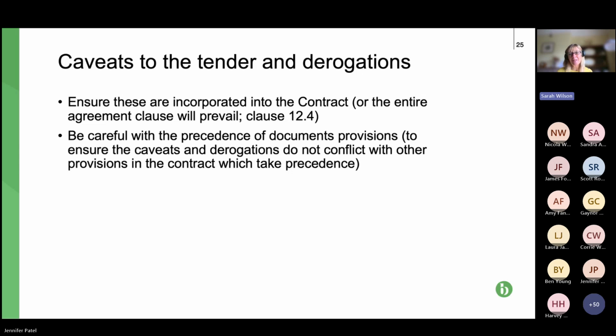The ones I've seen tend to be things like we're not responsible for asbestos, we have no liability for that, and if we come across it, it's an extra, it's a compensation event. Ditto all ground conditions. Ditto all third parties, so all sorts of items like that, and usually there is a list of items where a contractor or subcontractor has been caught out in the past.